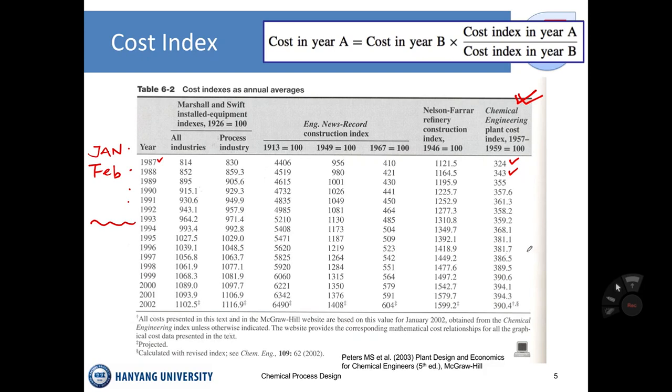It's not going to be proportionally increased or continuously increased based on the change of the year. So if you're looking at the index, some years up and some years down, okay? So it depends on the engineering community, plant engineering community and the plant industry. Some years there are a lot of plant projects, but some years not. And depending on the boom of the project, or depending on the progress of the number of projects in the industry, the plant index may increase or decrease.